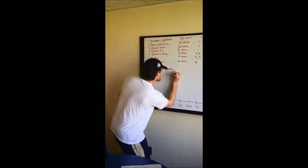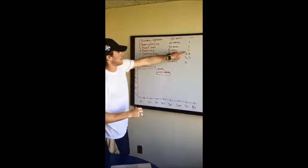And our fourth is preparing the tray. That takes five minutes. But again, proceeding has to follow the first step, which is 30 minutes. So it takes five minutes. It'll start at 30 and then at 35.